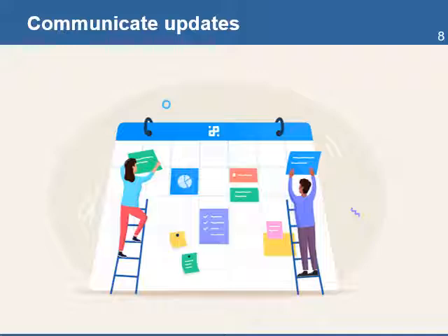Once the changes have been approved and the schedule has been updated, you need to communicate the new schedule. This can be done during the regular reporting periods, or if the change is significant, you need to bring it to the attention of all stakeholders impacted by it. Failure to communicate properly may result in people following the old schedule.